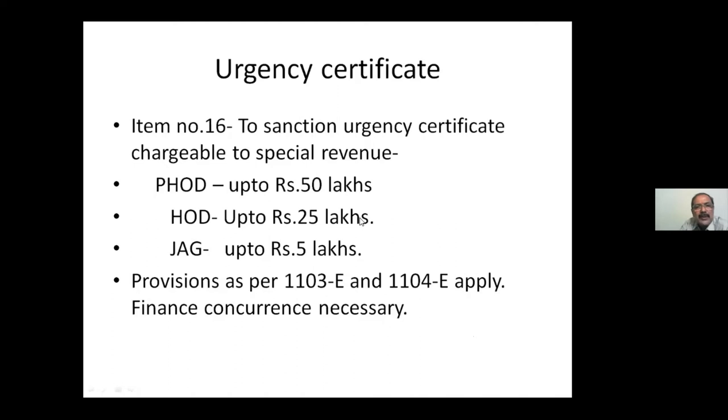Urgency certificate also explained in case of single tenders, where the work has come without any expectation. That is due to some emergencies, some traffic disruption or breaches of track, उसके वजह से आपको काम करना पड़ता है. तभी क्या करते हैं आप? You will not invite open tender, it is a time consuming process. So एमरजेंसी में जो भी काम बुलाया गया है सिंगल टेंडर में, for that we have to send urgency certificate to Railway Board in order to get the funds under special revenue. उसका पावर्स भी दे दिया: अर्जेंसी सर्टिफिकेट भी HOD का है up to 50 लाख, HOD का है up to 25 लाख, JA ग्रेड का है 5 लाख.